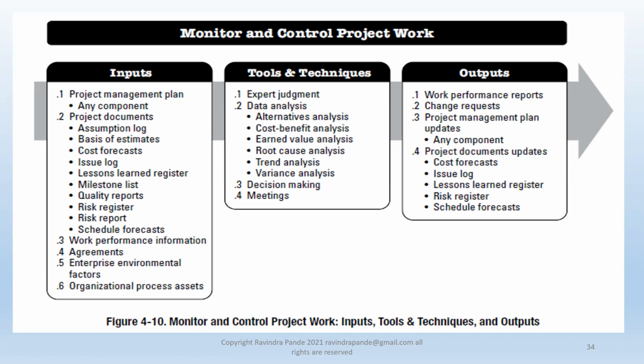Again, lessons learned register. Whatever repetitive additions we see, we might need to pad these tasks with all these repetitive additions from a typical client. And that's how you might replan your project to get it executed better. You might reach a near practical planning where whatever you plan is more concrete, more realistic than other managers. And that's how the maturity of project managers gets measured. All such best practices have to be archived as knowledge in the organizational knowledge repository via lessons learned register type of processes.